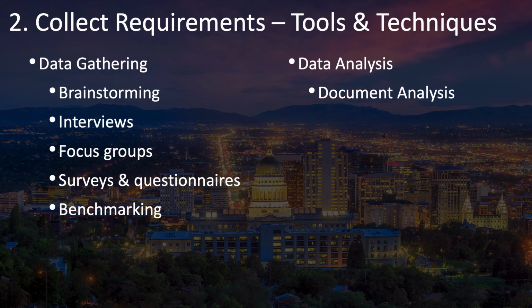We've already discussed brainstorming, which can include your simple brainstorming, but also your brain writing, which involves writing it down first before you start your discussion, or the nominal group technique, or even the Delphi technique that has these multiple iterations of experts privately providing their recommendations and then sharing those also anonymously until you come up with one or more excellent options.